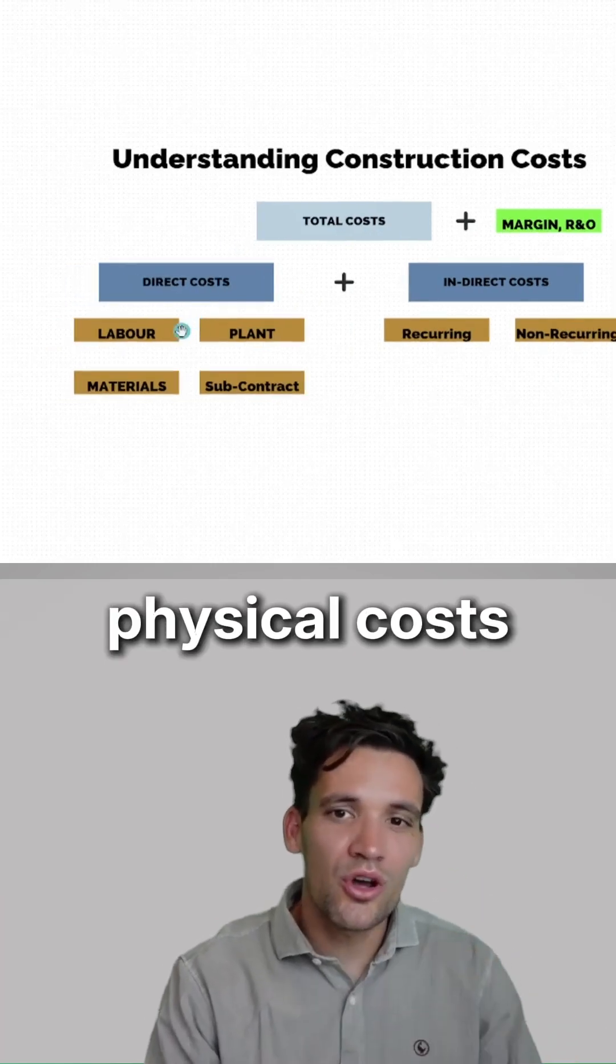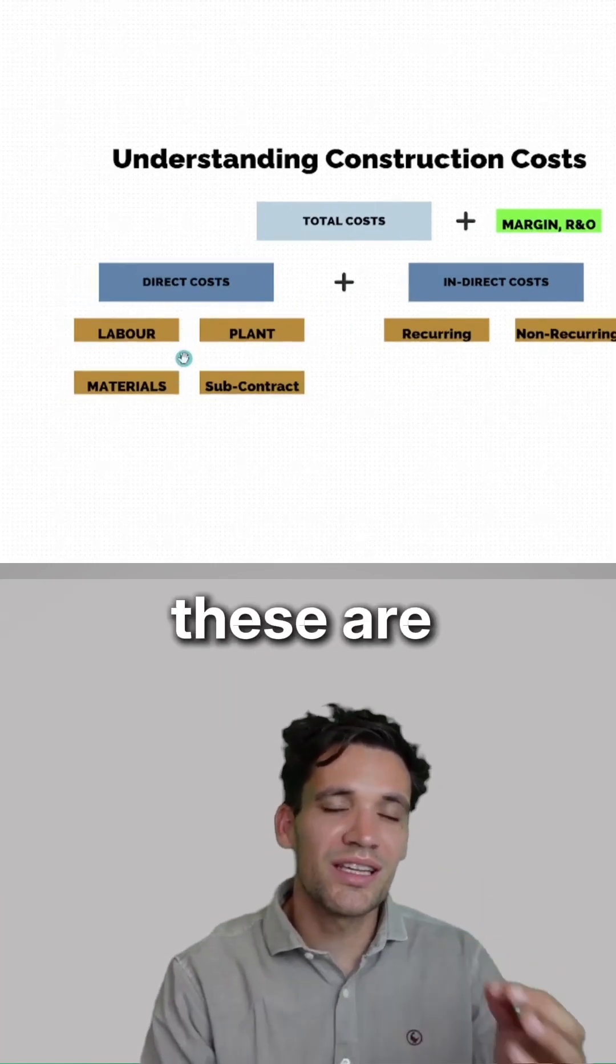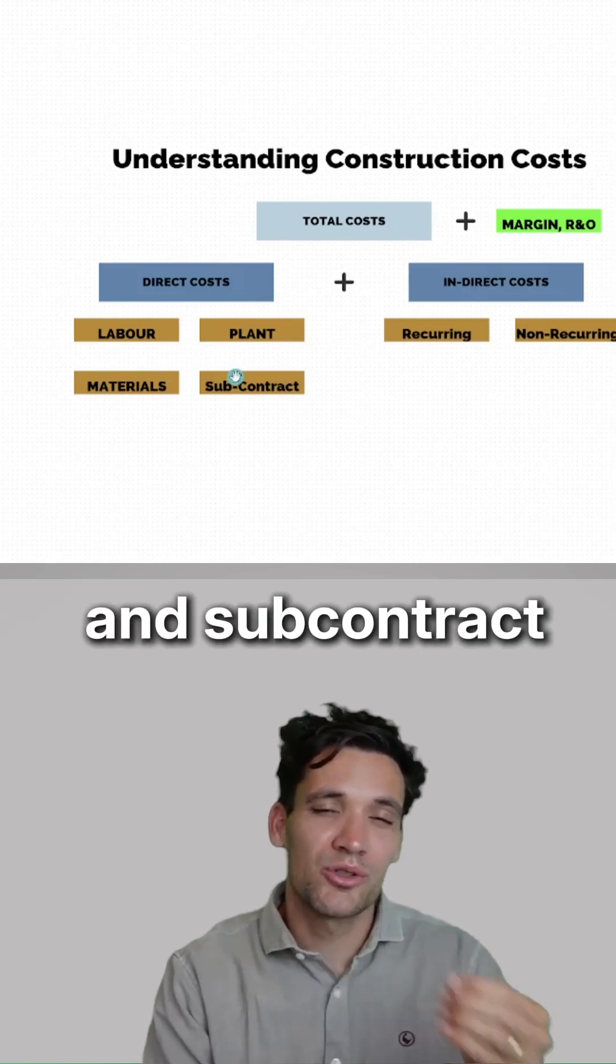Our direct costs are the physical costs of building a construction project. These are made up of four components: labor, plant, materials, and subcontract.